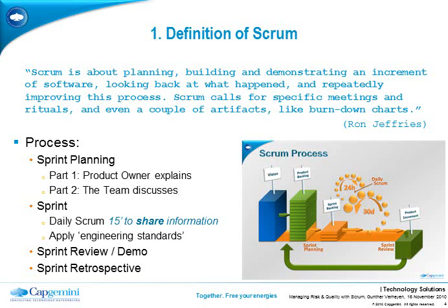During the sprint, the team applies to-be-defined engineering standards. Engineering standards will depend on technology, platform, technical framework, whatever. And at the end of a sprint, the team will do a sprint review, in which the software that has been built during the sprint, during the iteration, will be demoed. And the team will afterwards look back at how they've performed, how they've worked, what they've done, what they should have done, and so on, to learn: the sprint retrospective. The day after the sprint retrospective, the new sprint planning starts. Short, I hope it's quite clear.